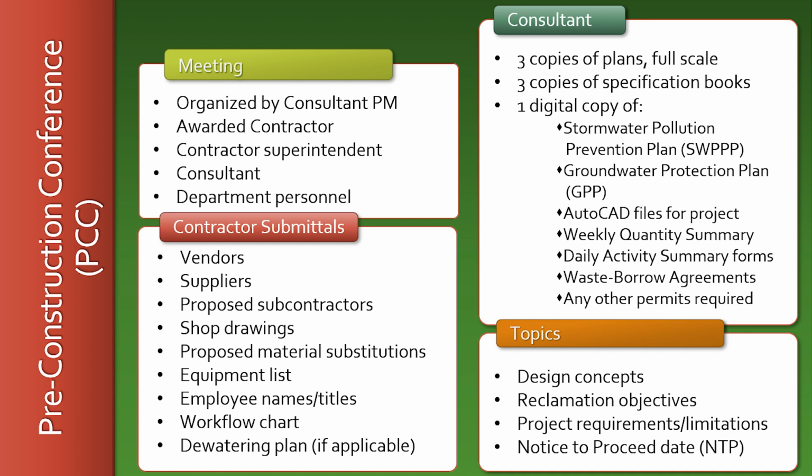During this meeting, the consultant and the contractor will establish a notice to proceed date for when construction can begin. The consultant will reiterate the design concepts, reclamation plan objectives, and convey all project requirements and/or limitations. It will provide the contractor 3 copies of the design plans at full scale, 3 copies of the specification books,